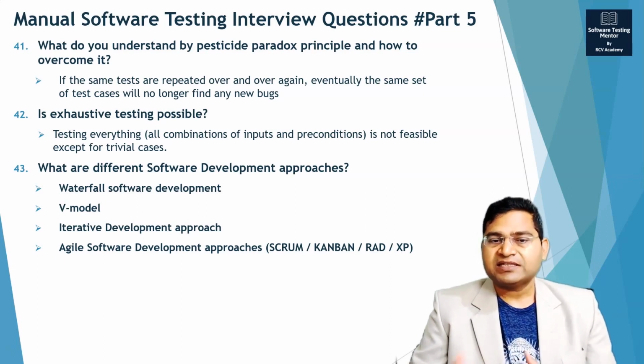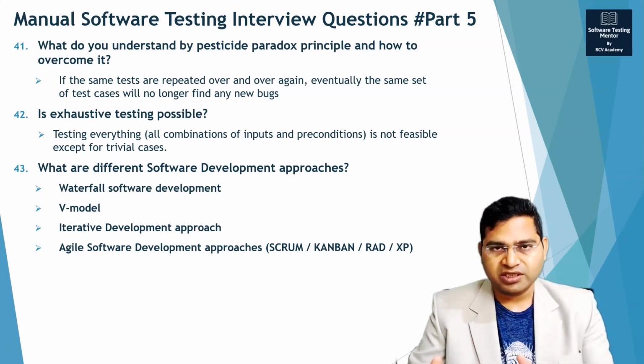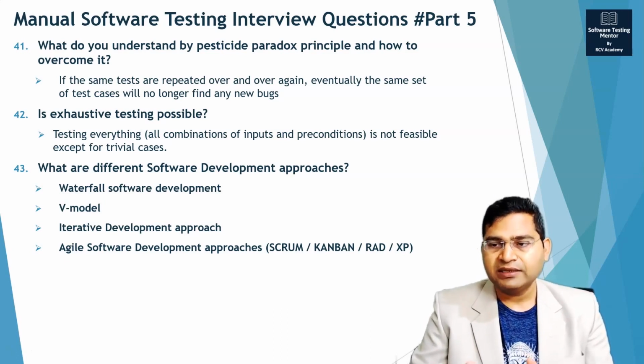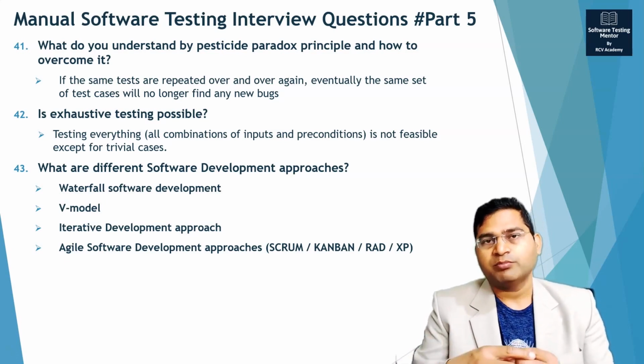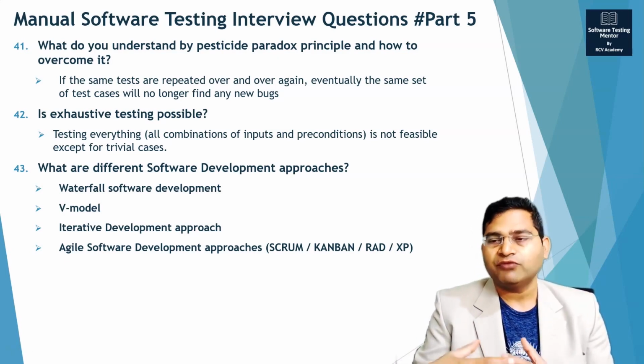And then agile software development is an improvement over iterative development approaches, and because agile is also iterative, you have sprint by sprint, right? So a 2 to 4 week cycle, and the product features are developed in these iterations, so feedback is available very early.